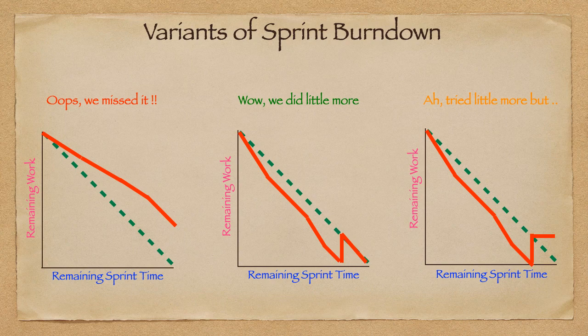And you may ask a question, why are we tracking based on the story points? Why can't we track based on the number of items selected? The problem with tracking based on the number of items selected into the sprint is, let's say the top 2 to 3 items are simple and easy, and will be completed early. In that case, the burndown shows false progress. What if the remaining 3 to 4 items are complex and take longer, which shows a false progress as if you are running faster. So tracking based on the number of items is not a good idea.